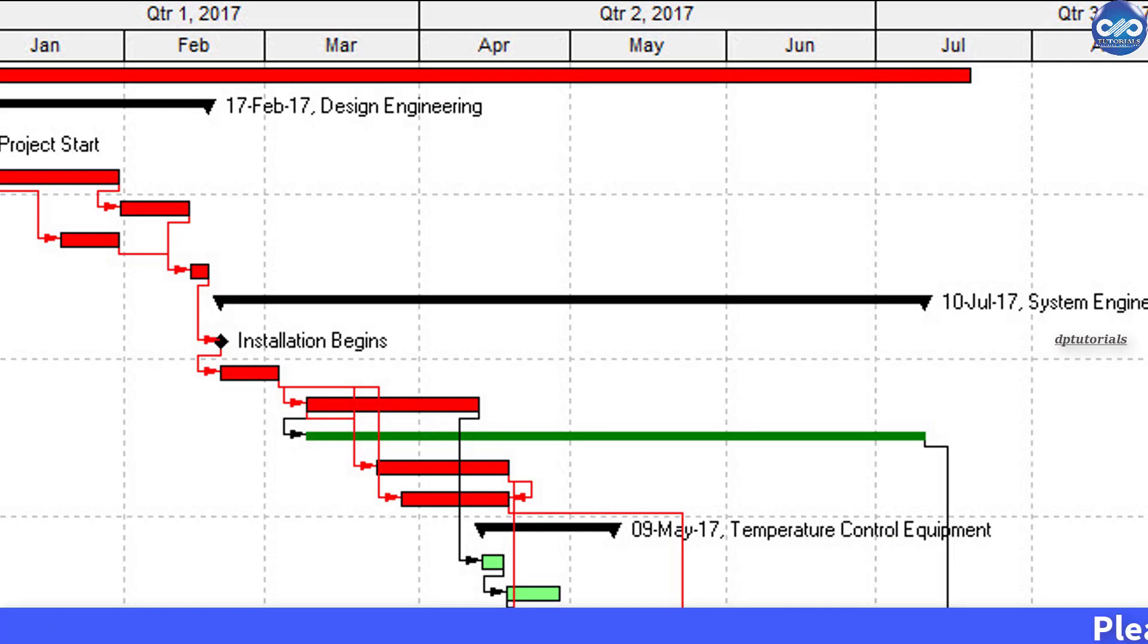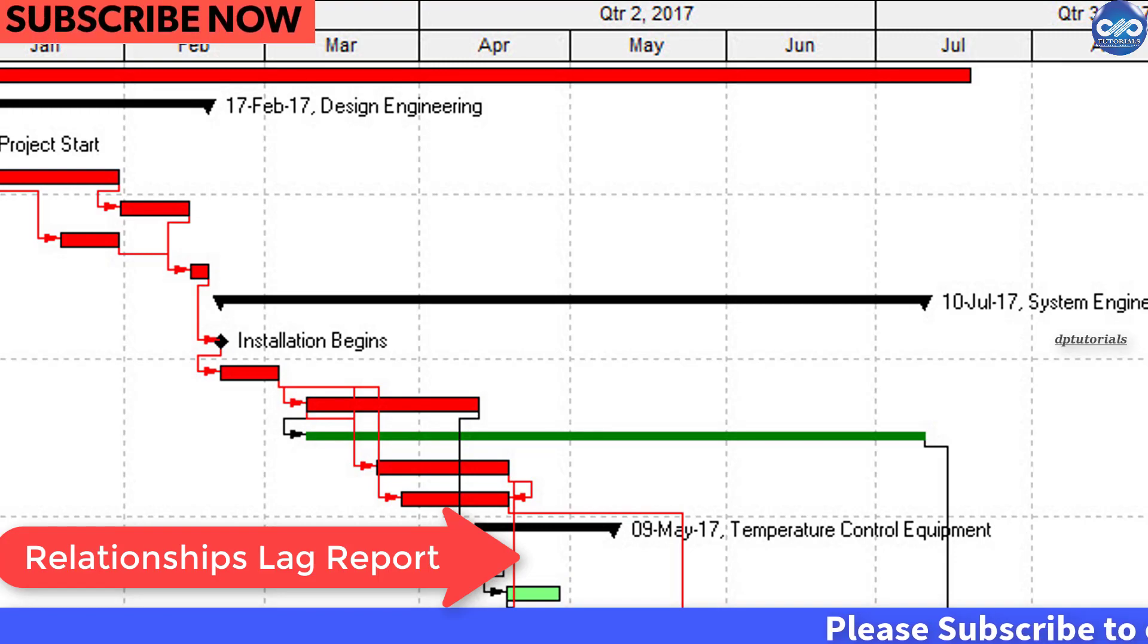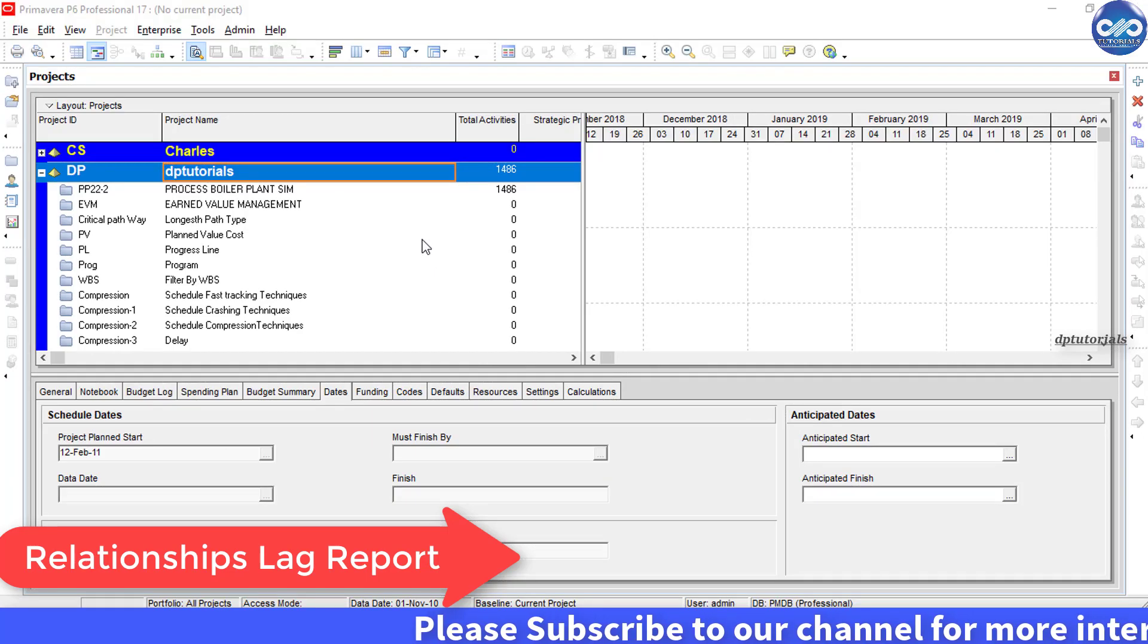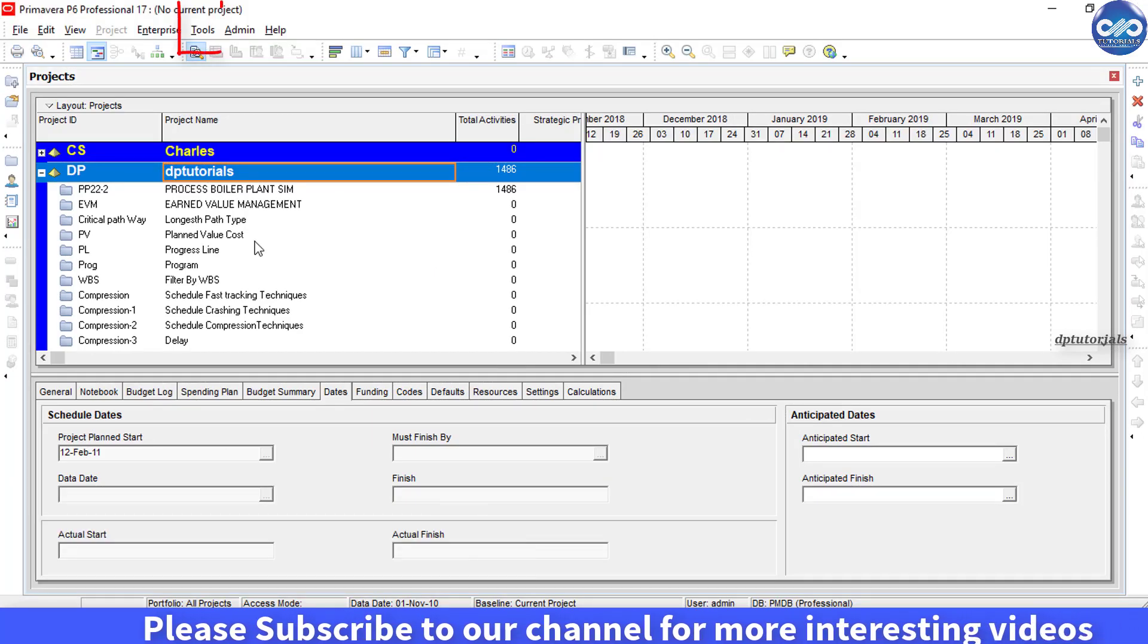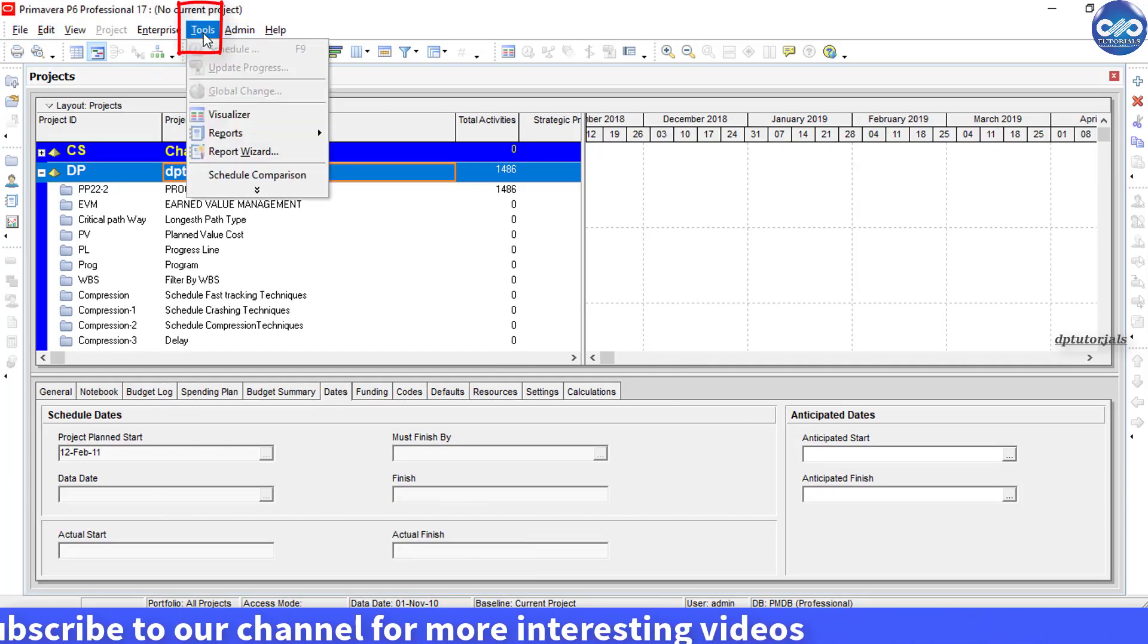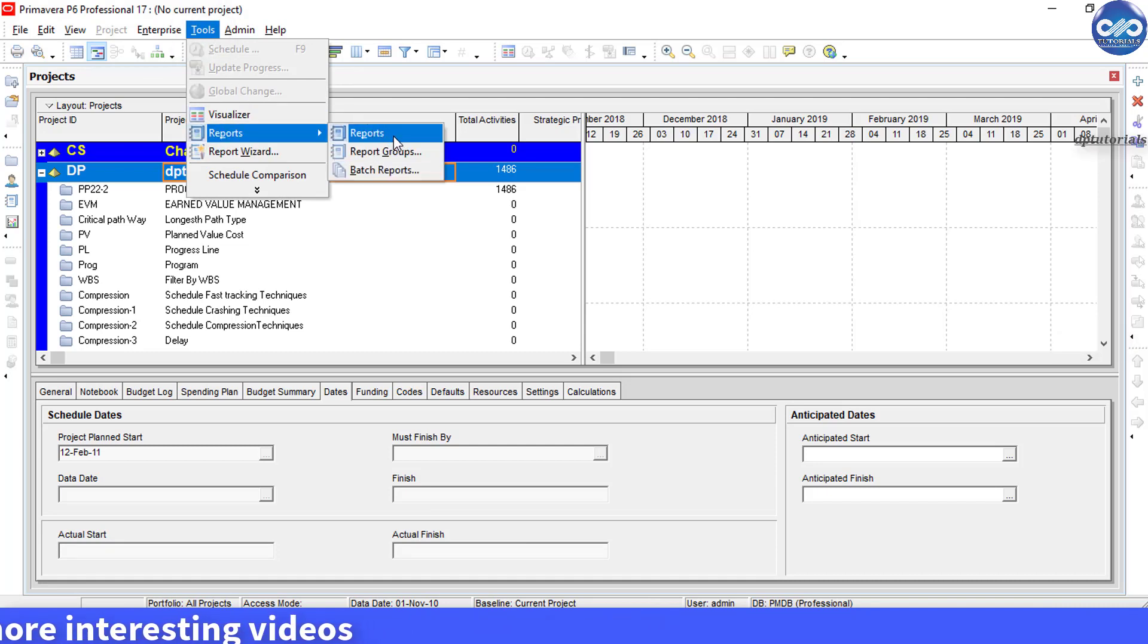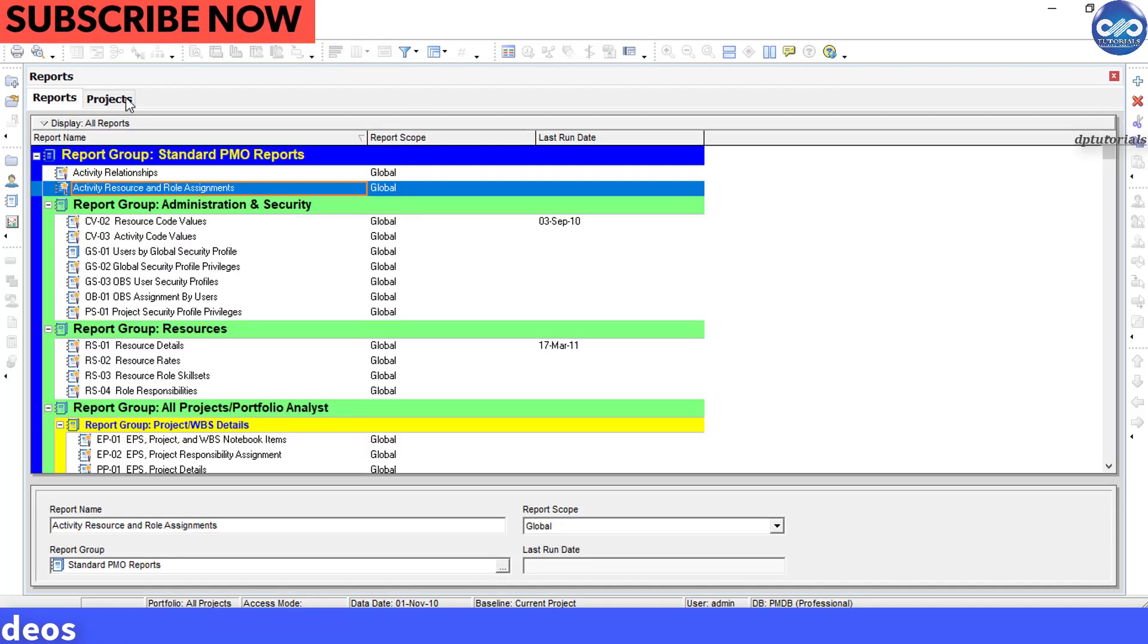So let's learn how to create a relationships lag report in Primavera P6 now. Open P6 and from the menu bar, go to Tools and click on Reports and then select Reports. Now you will be landing onto the reports window.